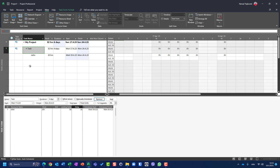What will you see? You will see that those four days duration for the task are the same. But instead of starting on Monday and finishing on Thursday, John will now work from Wednesday to Monday. On Monday and Tuesday, he's not going to work.